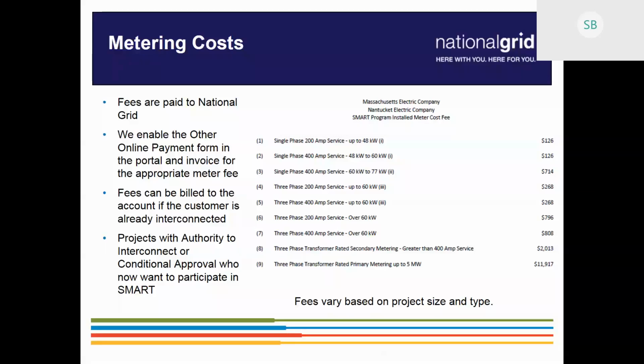On our end, when it comes to prioritization, we're obviously focusing on projects that are post-ISA now, and we've been working through those. We're working on a queuing aspect of how far along different projects are as we're prepping those. We're undertaking a considerable amount of work to get those GNFs filled out. We've got a number of resources working directly with Carlos, his team, and the ISO team to make sure we're getting those submitted as quickly as possible, to not further delay any next steps that we need to have with the ISO.